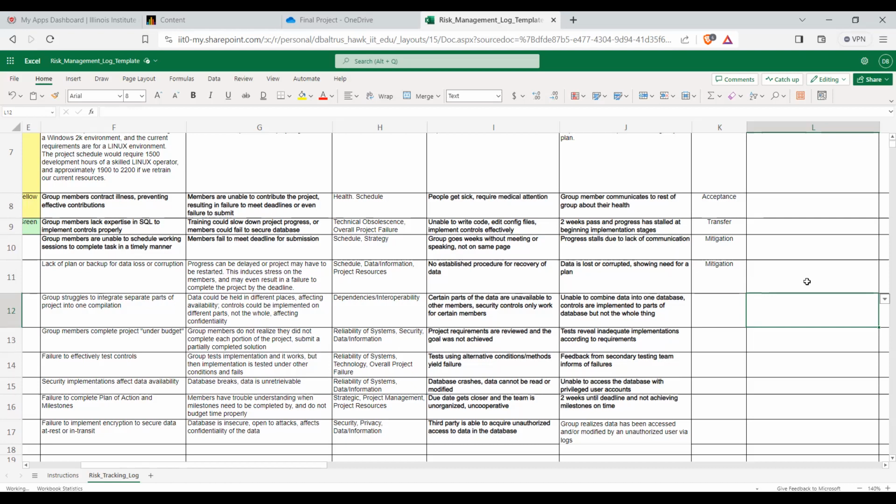Ways to avoid it. You could think, I'm going to avoid this risk by making sure I have appropriate action in place where I don't have to worry about this risk at all. If you're considering that you're going to have an issue implementing a certain control, you need certain expertise, I'm going to avoid it. I'm going to automatically go and hire somebody, have it in here, so it's not a risk.